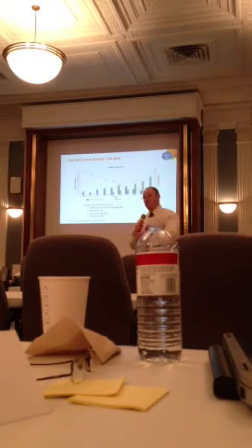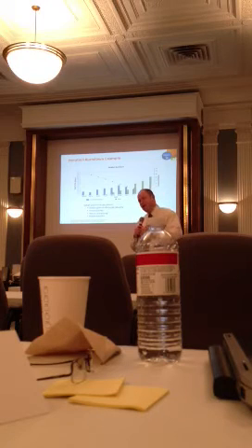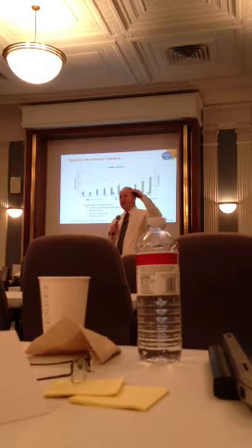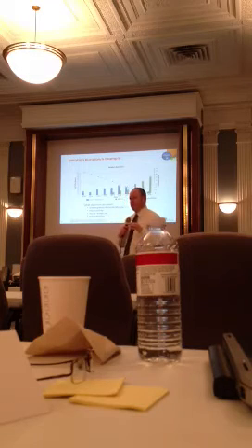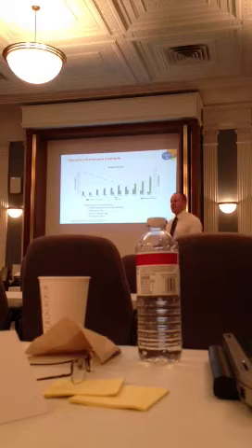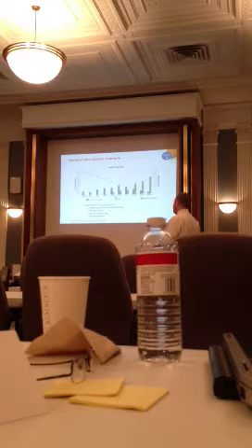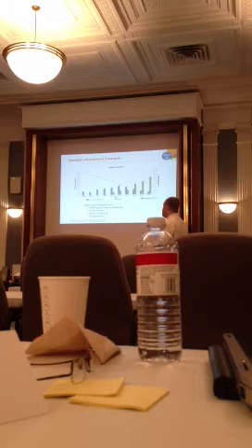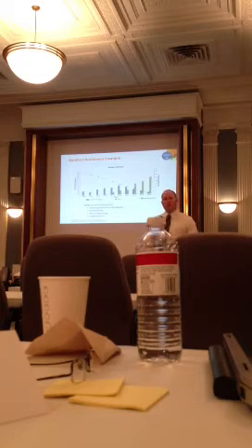But we completed 35, right? So there's a going down with the amount of work we're getting done, and then it's going up with the new tasks that we're adding. Make sense? So same thing happens then on day 3, where from 40 we go down to 5, and then we're up to 80, so we added like 75 hours worth of tasks on day 3. We added maybe another 50 or so hours worth of tasks on day 4. And notice we get our first little bit of acceptance on day 4.